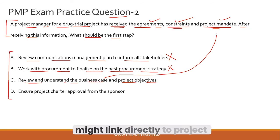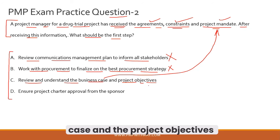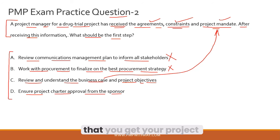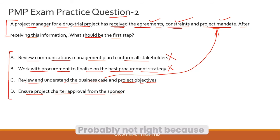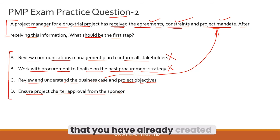Option C — review and understand the business case and project objectives — is a good option. The business case links directly to the project mandate, and as project manager still in initiation, it is sensible to review and understand the business case and project objectives before proceeding. Let's hold this and evaluate option D: ensuring project charter approval from the sponsor. This could be an option, but ask yourself — has the project charter already been created?